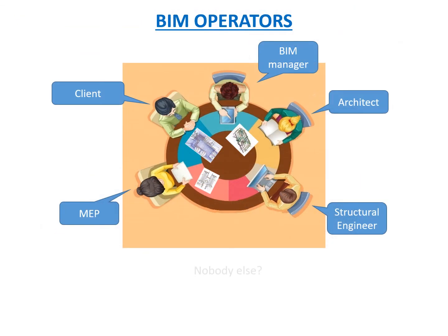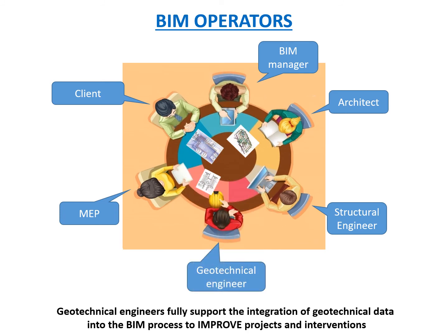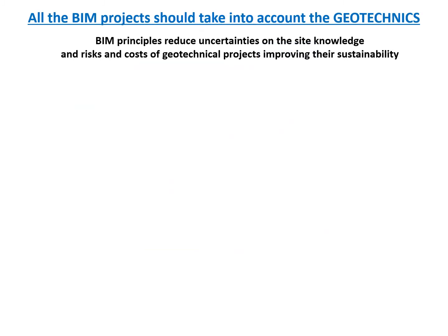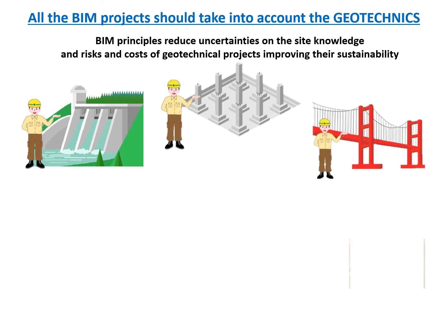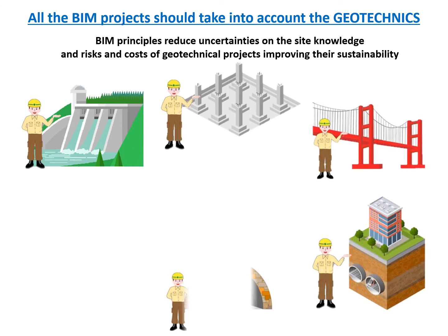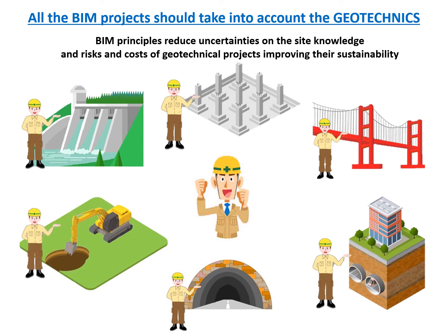The data analysis revealed that BIM would benefit from the inclusion of geotechnical data, which in turn would benefit the project management strategy, as demonstrated in the case study. Unseen subsurface ground conditions are among the biggest areas of risk and uncertainty in any construction project. Furthermore, the integration of geotechnical data provides significant cost and time savings in major schemes. As such, all BIM projects should take geotechnics into account.